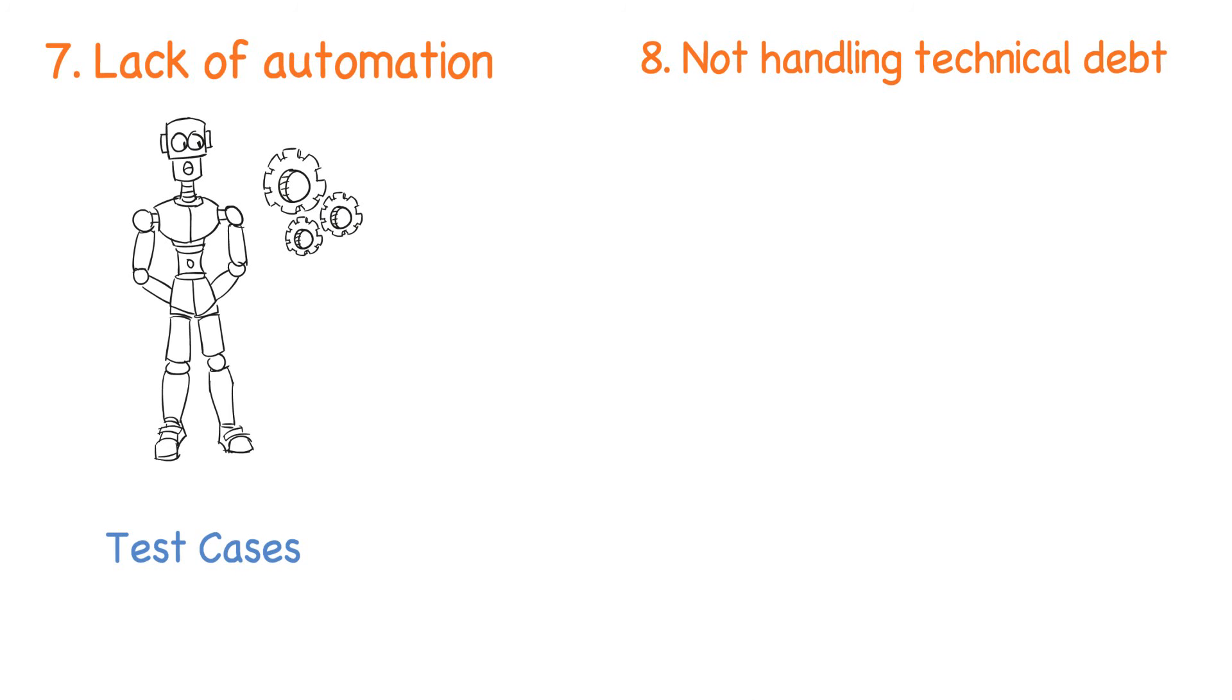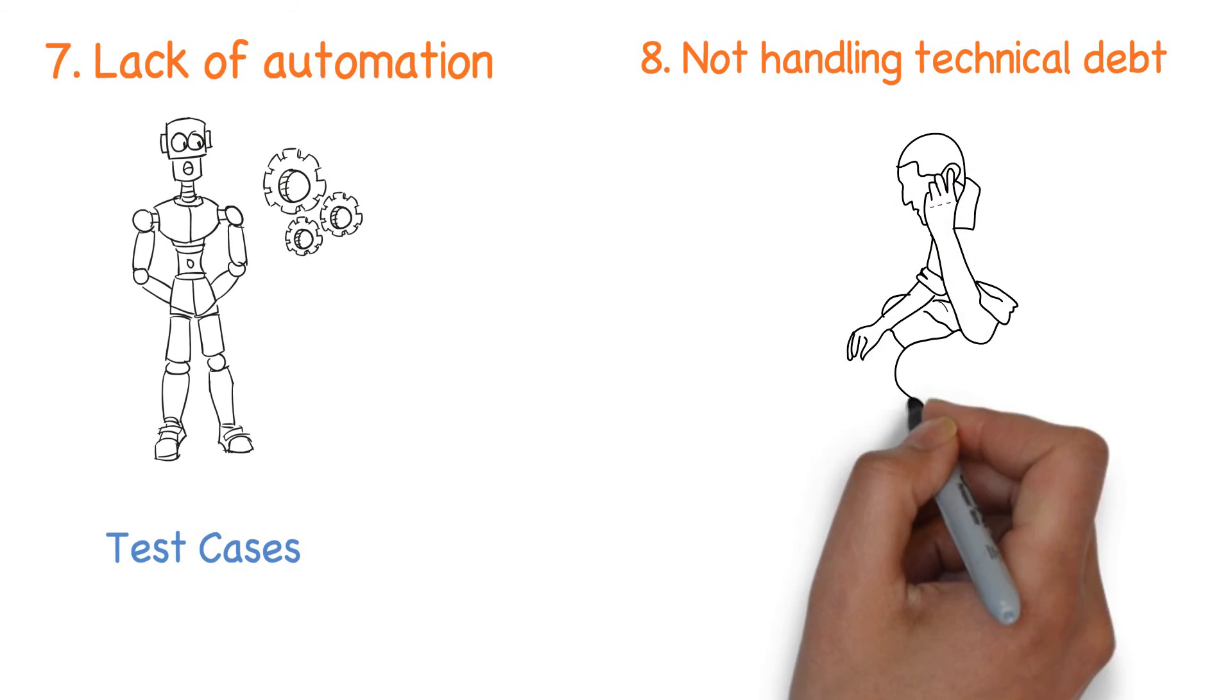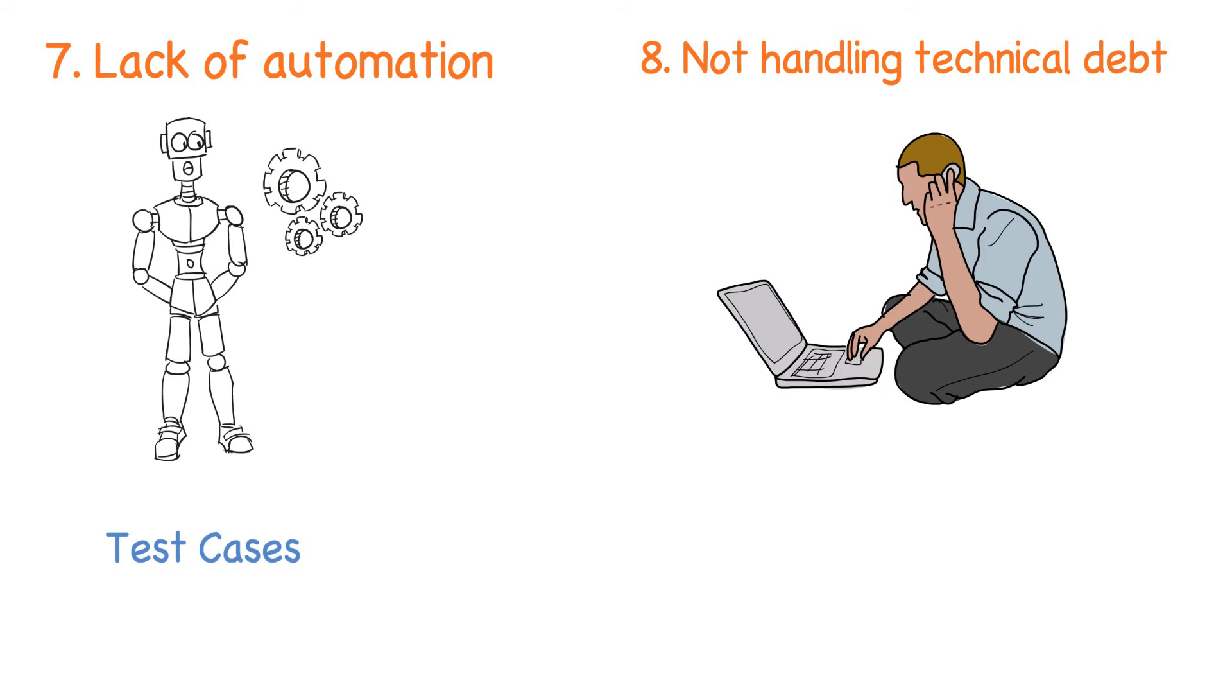Not handling technical debt is another cause for Agile failures. A project with a large base code implementing Agile without a roadmap to improve the code quality would pretty soon end up with a deluge of bugs and blame Agile for exposing them.